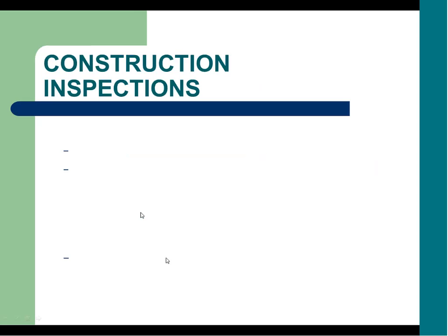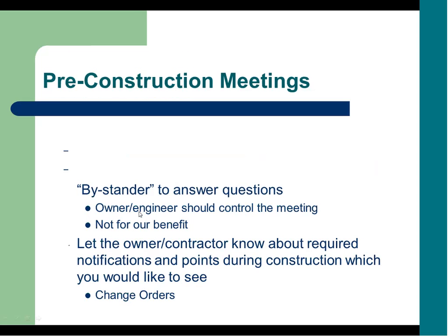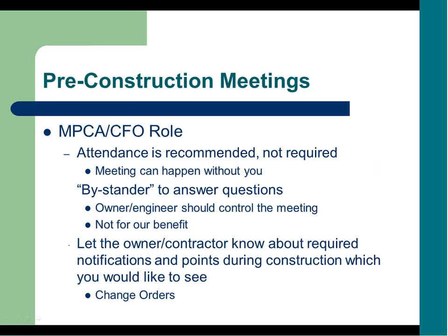Now getting to the crux of why we're here, the construction inspections. Starting out with the pre-construction meeting. Pre-construction meetings are required, but you are not required to attend. The role of both PCA and CFOs in the pre-con is to be a bystander. You're there to answer questions. You should not be running the meeting.